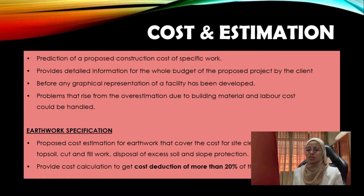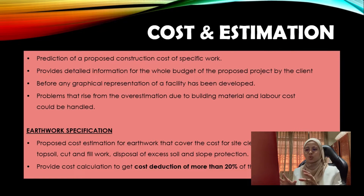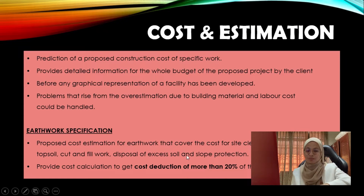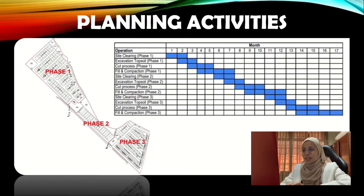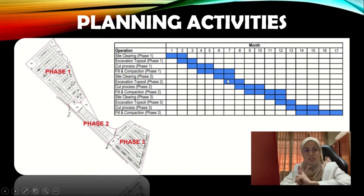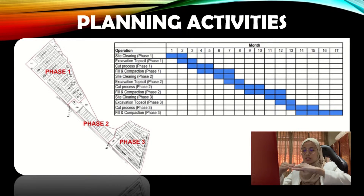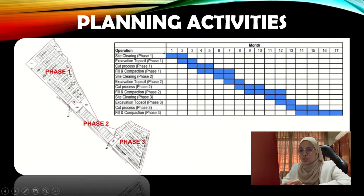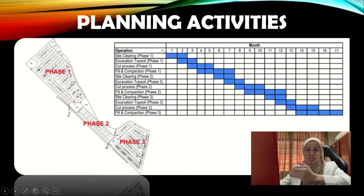The proposed cost estimation for earthwork covers site clearing, excavation of topsoil, cut and fill work, disposal of excess soil, and slope protection. Their goal is to achieve a cost reduction of more than 20% if possible from the original planning. The proposal is divided into three sections, and a planning activities table schedules each operation by phase — phase 1, phase 2, and phase 3 — managing each activity by month so the project can be completed within the client's requested period.